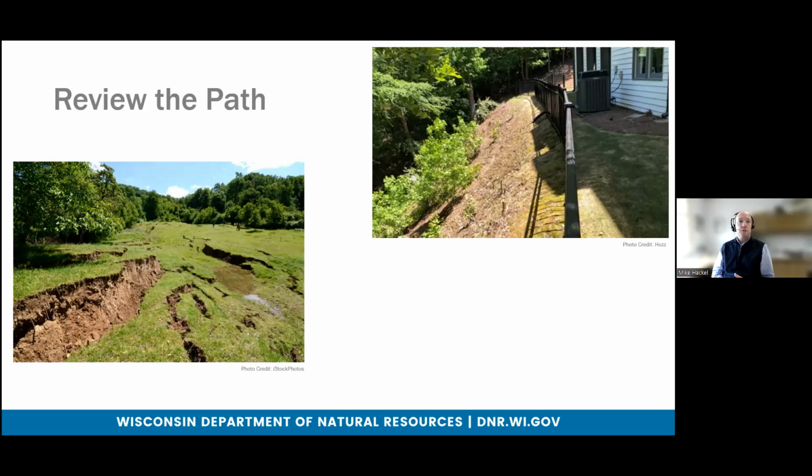The next factor in constructability is reviewing the path for existing topography. Does the topography lend itself to the use of HDD? Or is there a greater risk of an IR because of the topography that we are going to be drilling through? Does the existing soil show evidence of movement or instability, such as slides?